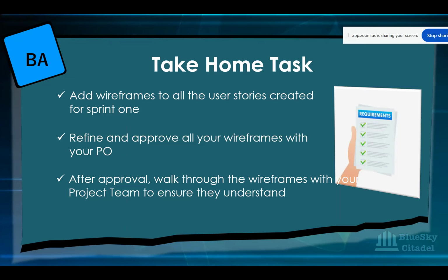So when you pull up your story, all you do is read your story. Every detail is there. If they ask you a question and it's not included, include it, because they need it to work. So don't start explaining your user story or start explaining your wireframe. Once you do that, that's wrong. Everything must be contained in your acceptance criteria so it can be tested and developed, or developed and tested.